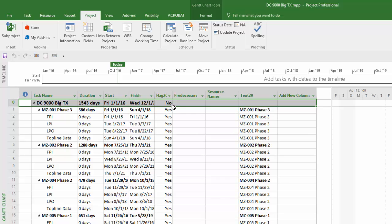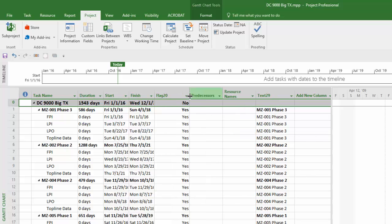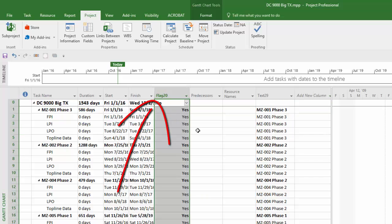The second is your flag column selection. You must use the same flag column across all of your project files when you are creating a visual in OnePager, as you can only select one flag column in the OnePager choices form.